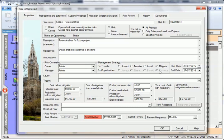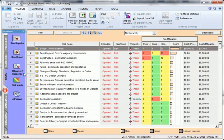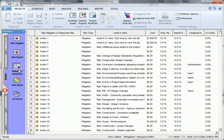If you decide to mitigate the risk, you can develop mitigation plans. They are presented in the mitigation response view. Plans can have sub-items which make up a series of steps that will be taken to minimize the probability or impact of the risk. For example, you may want to move a risk from red to green on the risk matrix.